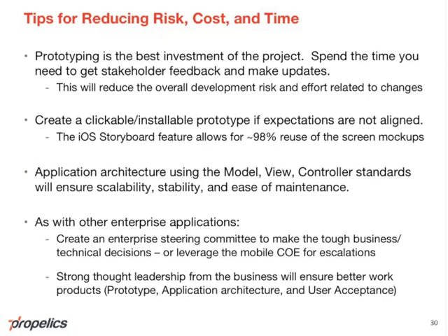So the first 3 bullets on this, mobile specific, just top of mind: prototyping is the absolute best investment you will make on your mobile project. Spend the time you need, get your stakeholder feedback, do it iteratively. It'll reduce your overall development risk and any cost related to changes.